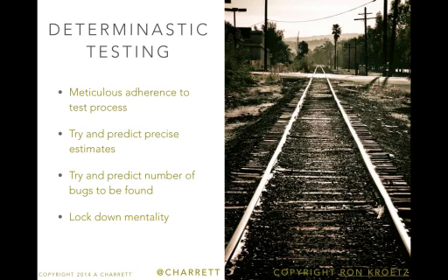But we look at this and we want to be more efficient. One of the things that I see is that in our drive to be as predictable as possible, we start de-scoping, right? Because to make things easier to estimate, to make things easier to predict, we take out the complexity, right? And if we take out the complexity in our testing, it's easier to estimate.